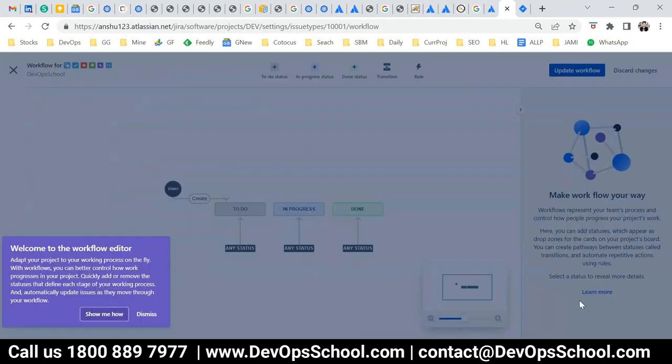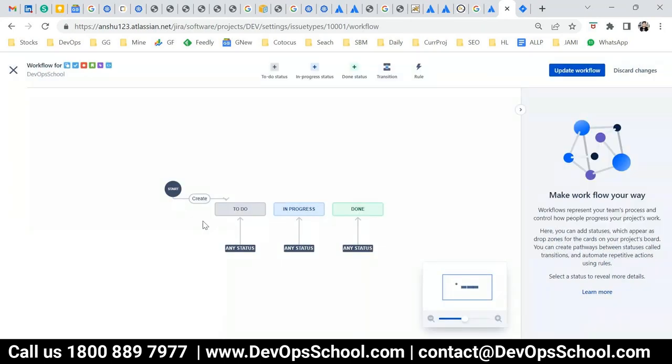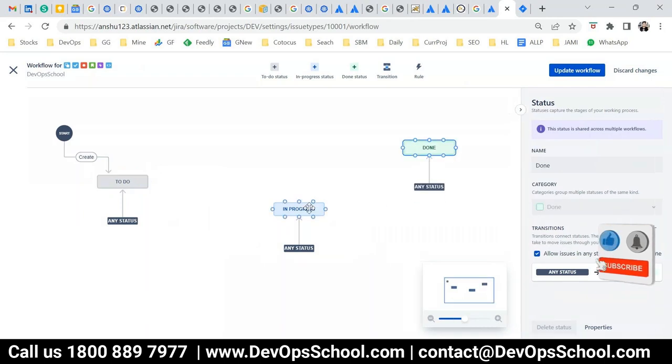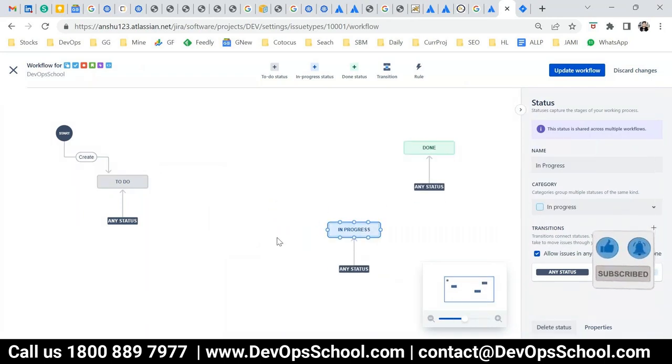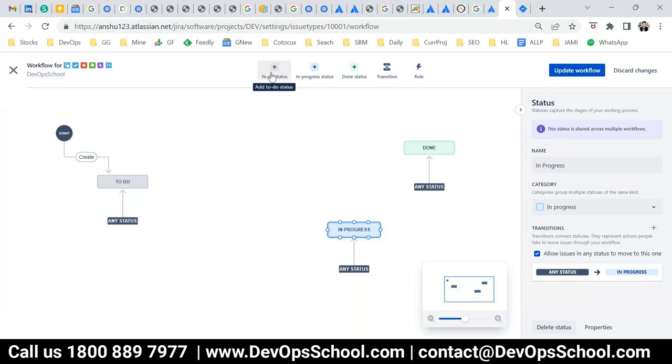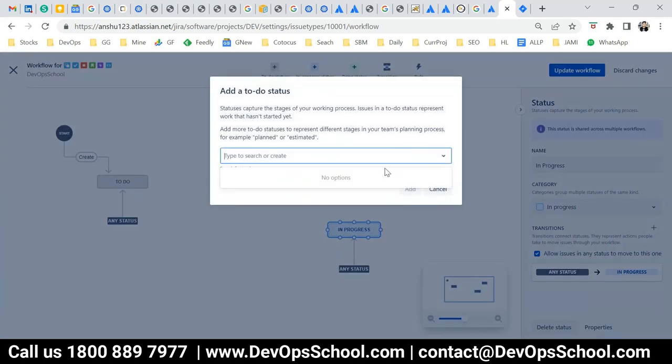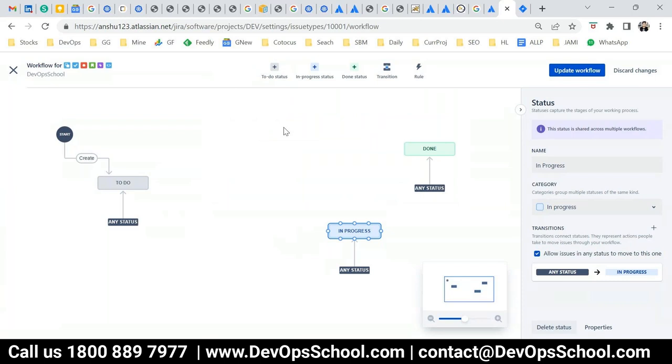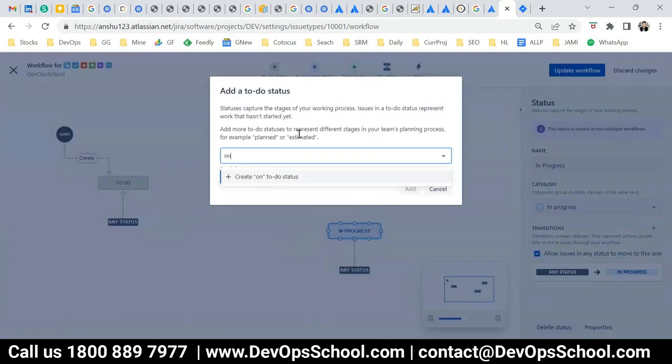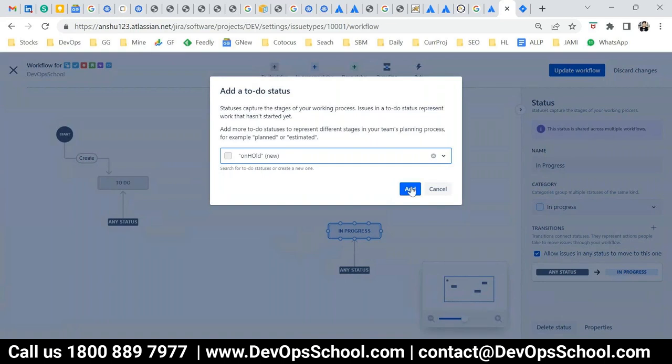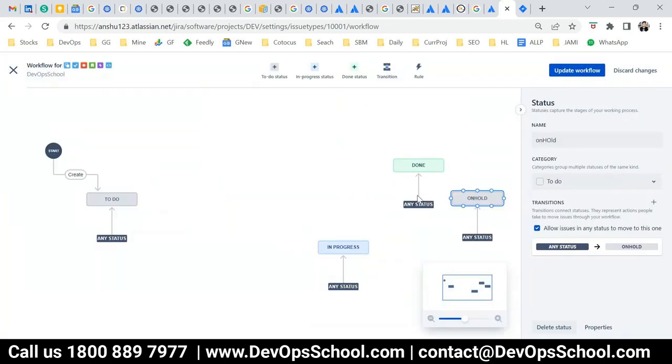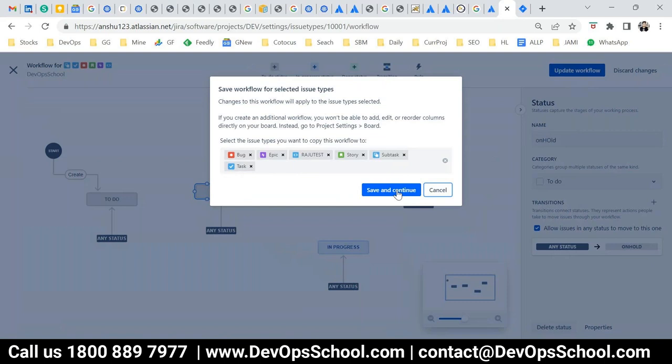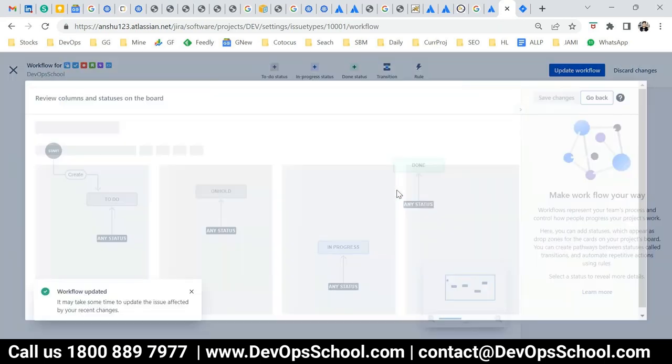Someone is saying, hey, let's add on hold also as part of the workflow. So ticket should be on hold for some reason. What to do? You can click on edit workflow. Now I know that for this practicing you require lots of time and patience. This is a UI part, you can create a flow depends on drag and drop. Here what I'm doing after the to do, I'm adding one more transition and that is called on hold. Add a transition, to do status, and here I say on hold. It will create and add it. Now click on update workflows and save and continue. Done.